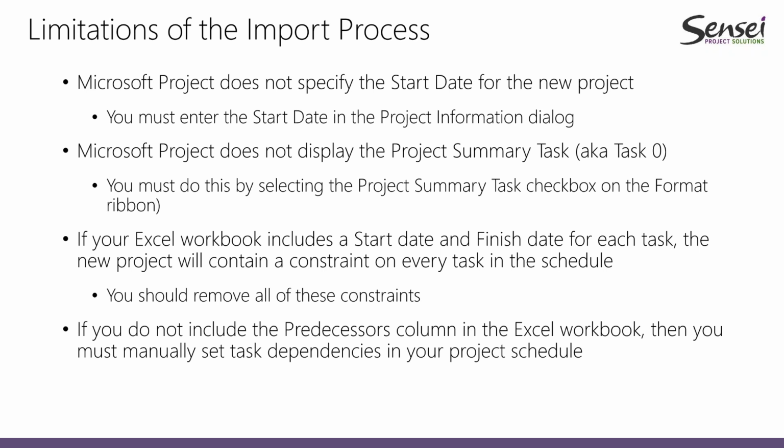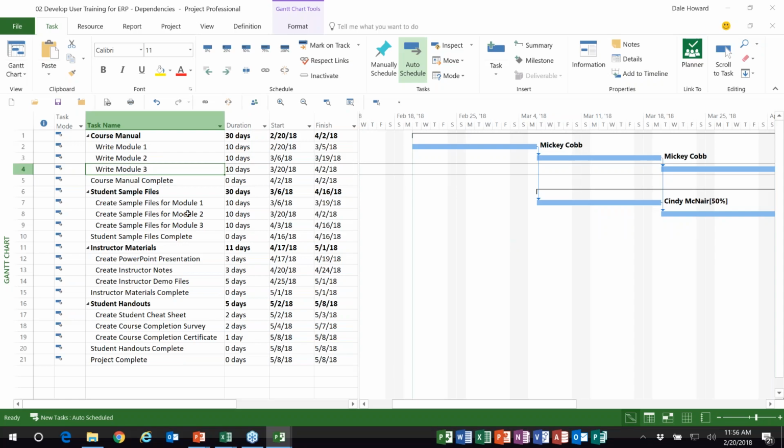And also, if you do not include the predecessors column in your Excel workbook, then you have to manually set task dependencies in your Microsoft Project schedule. All righty, so let me just show you in Microsoft Project. Here's what I will need to do.